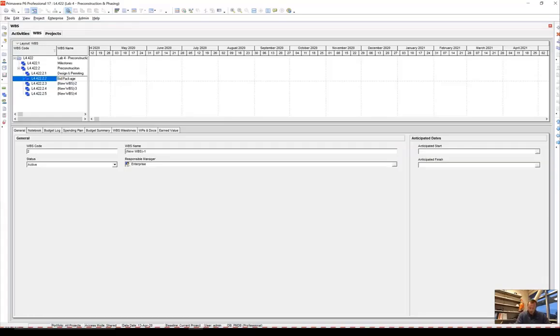After that, we got bid packages and scope buyout. So bid packages is really just comparing our subs apples to apples. So it's, yes, it's going out to bid, but it's receiving them, comparing them, as well as a lot of times getting them approved by the owner, and then contracting them. So that's kind of that last phase of scope buyout.